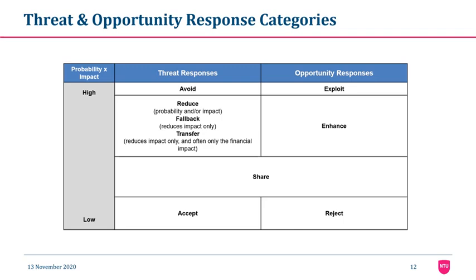Another risk is, let's say, hazardous material encountered during construction that will require an on-site storage area and potential additional cost to dispose. We accept this risk, but you should make sure that storage space will be available on site.